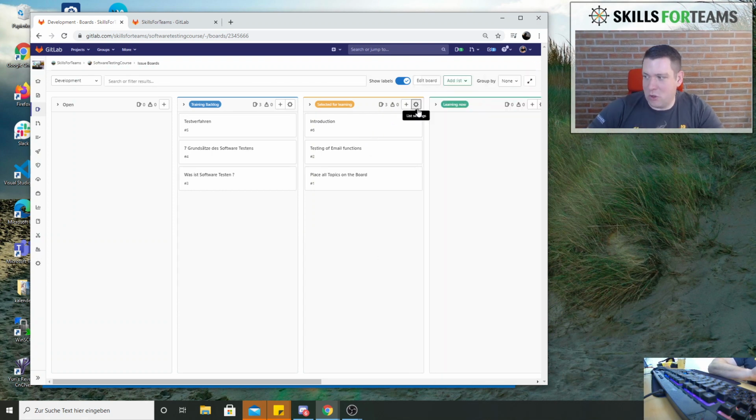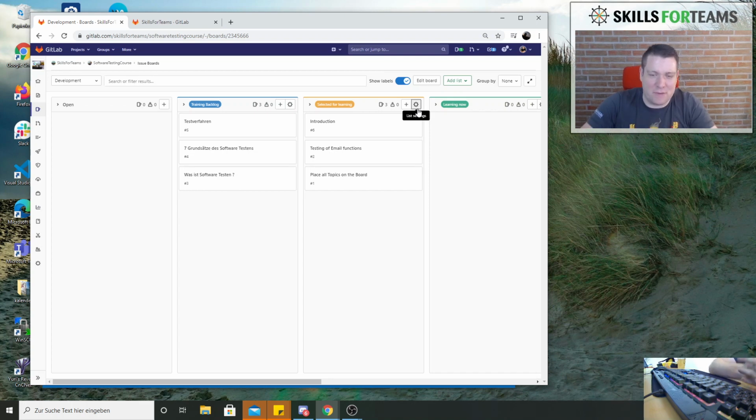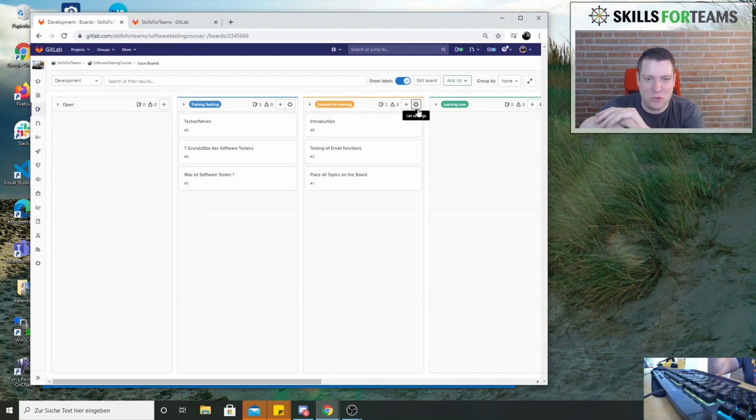For those who know Kanban and who are into Kanban, Kanban is one of the main, I call it mechanics, to manage not to do too much work at once and to manage the flow continuously. And the basic rule is if you do too much things at once, it will cost you time.